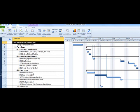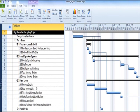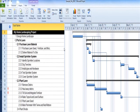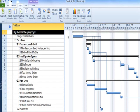A baseline is a static copy of planned data that's compared with actual and current data. For example, if a task starts earlier than was planned, it started ahead of time or ahead of schedule.